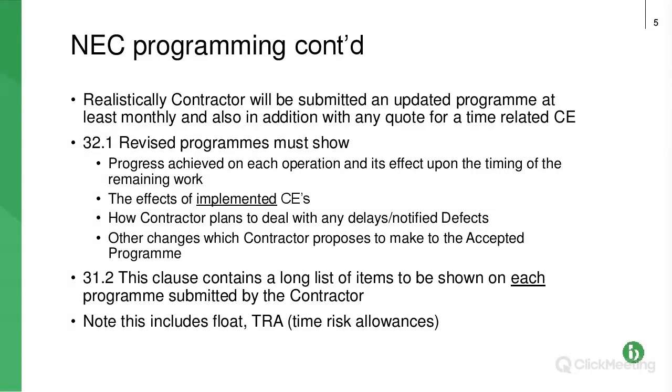I mean, my inclination is, how these programmes are used is that if you come to make a claim, whether it's a claim that's negotiated and you reach a settlement, or a claim where you're starting and progressing via adjudication or court proceedings, the key thing is that we have documentation to evidence the position. So I think if I were a programmer, I would be inclined to include unimplemented compensation events as well. So those where you've submitted a quote, it hasn't been accepted, etc. Just because that gives the true picture of what is happening, which is really what programming is about, giving the true picture. Today's programme gives the true picture of what is happening today.